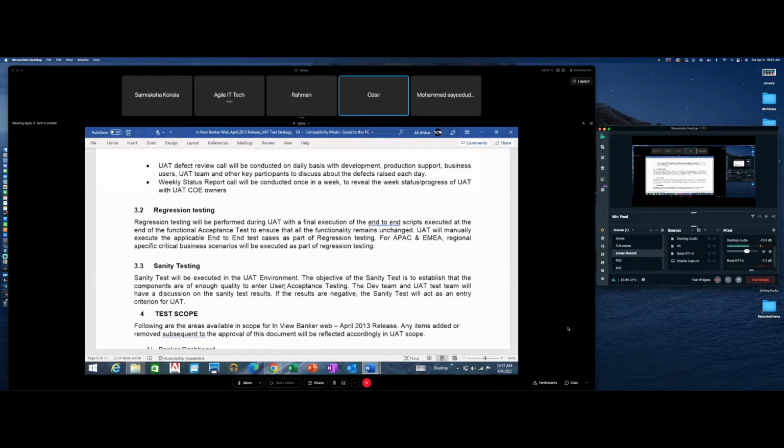So of course, when you're trying to do your estimates, which number would you work with? Would you work with the 200 test cases or the 250 test cases number to figure out how many testers you need? 200. You always take the lesser one, right? You want to leave some buffer, correct? So if one tester is doing 200, how many testers do I need to execute about 1,000 in a week? 5.